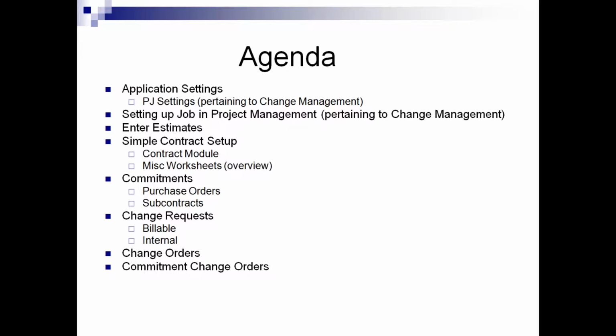Change requests are not mandatory, but they're useful from a documentation standpoint so that you can track who's asking for the changes and what's been approved as a request that can then be turned into a change order.